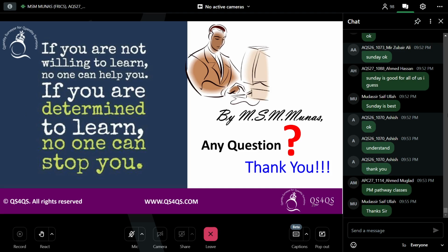Sir, one more question. Let me finish this, then I will come to it. If both parties agree, okay, Mr. Contractor, you keep the insurance until the performance certificate, then the contractor prices accordingly. That's the thing. Okay, what is the next question?